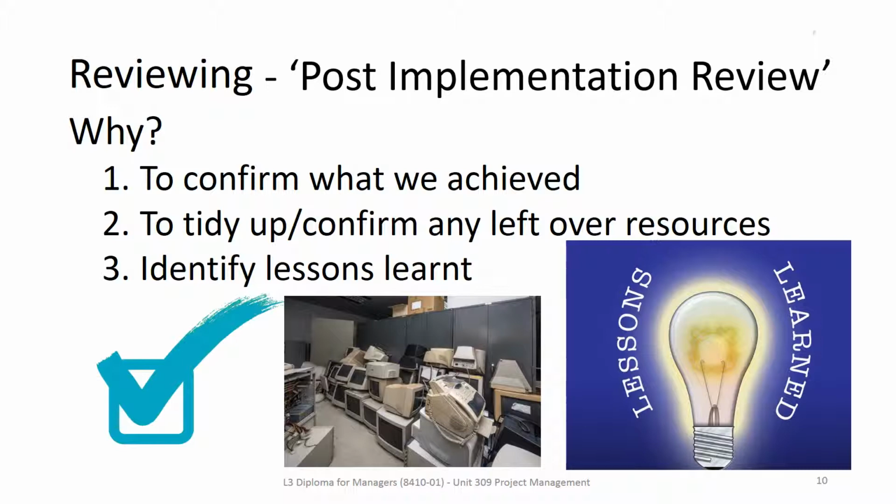It's part of the life cycle, and it's multi-channeled, and it's about all the documentation produced across the project lifecycle, looking back at the original initiation, planning documents and seeing where changes could have been made, any wrong assumptions that were made, and how that's impacted on things going forward. Looking back at risk logs to see if they were anticipated, if those risks turned into issues and materialized, or